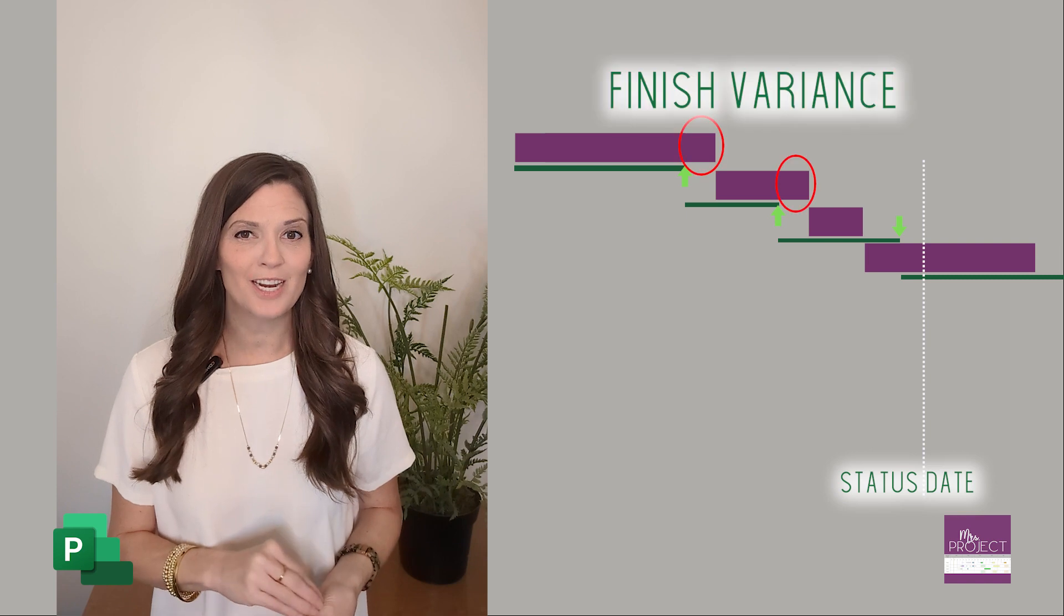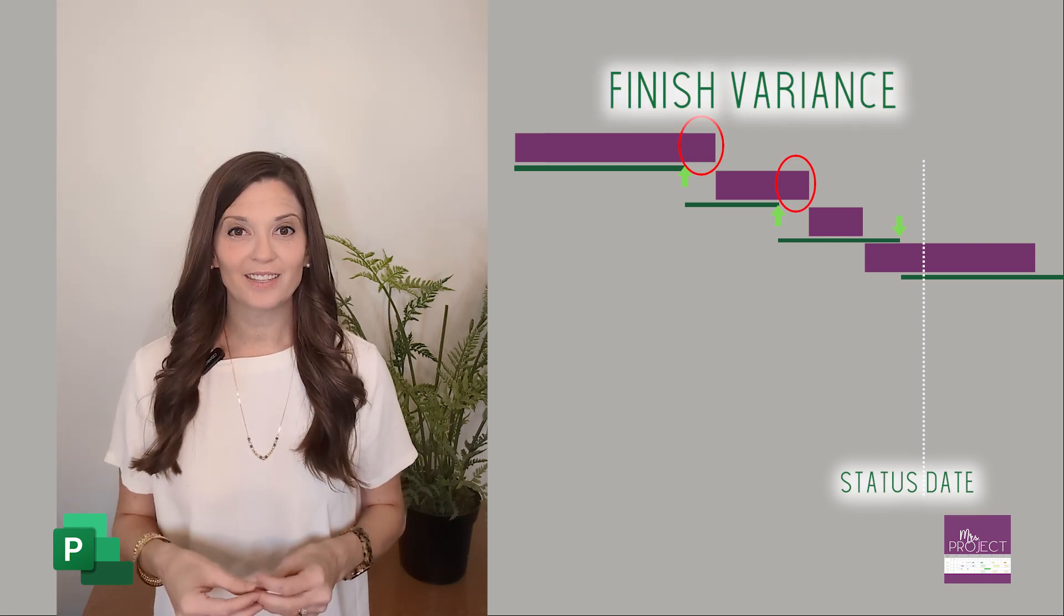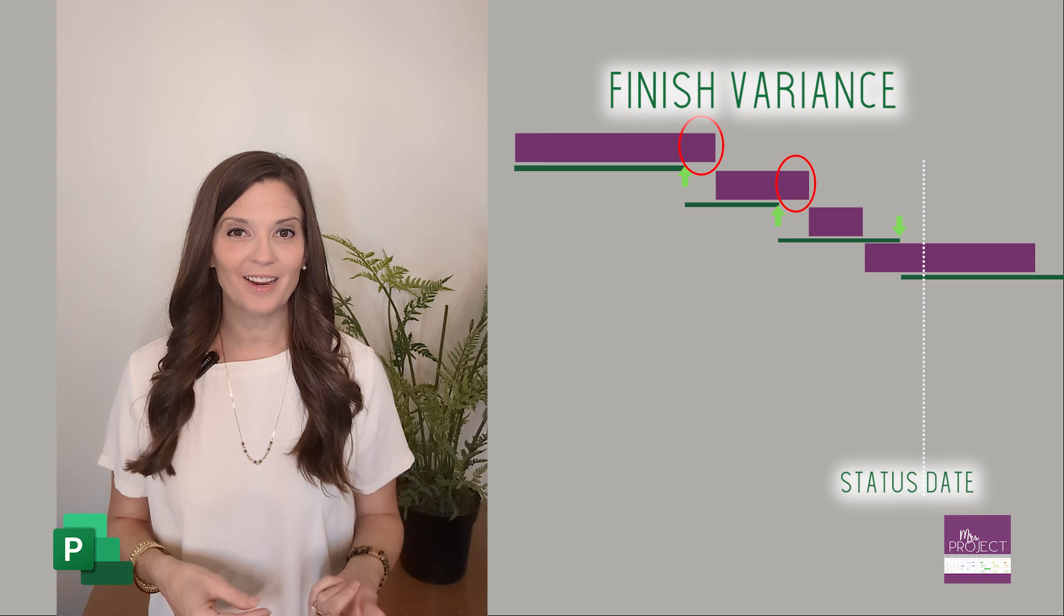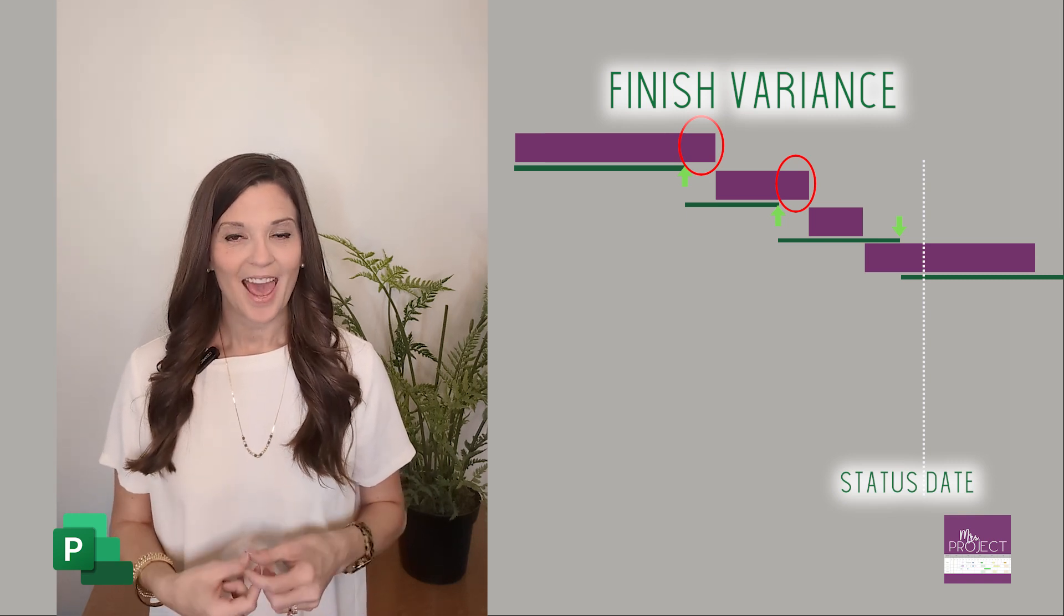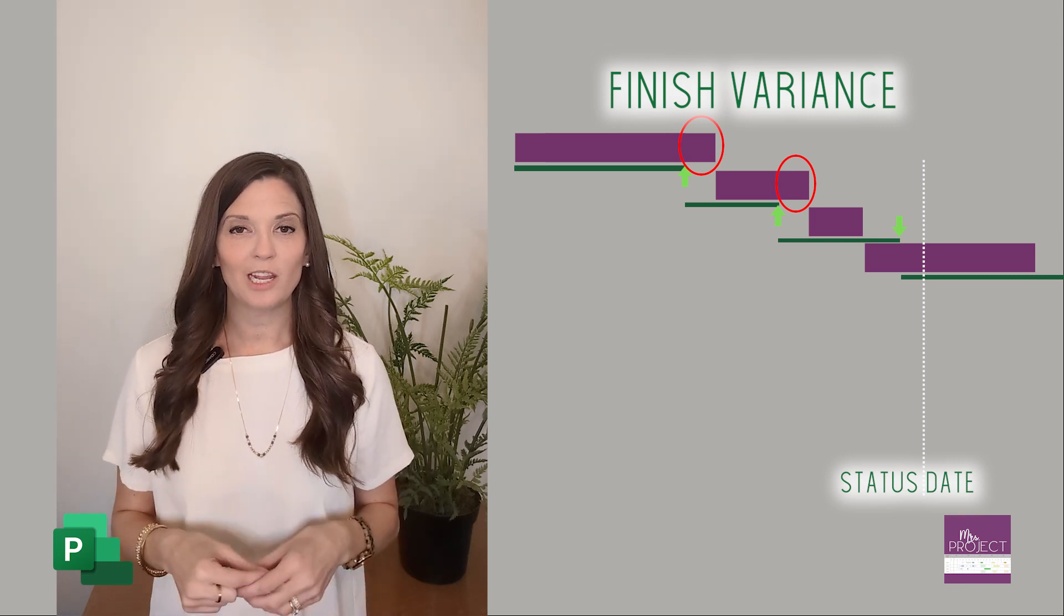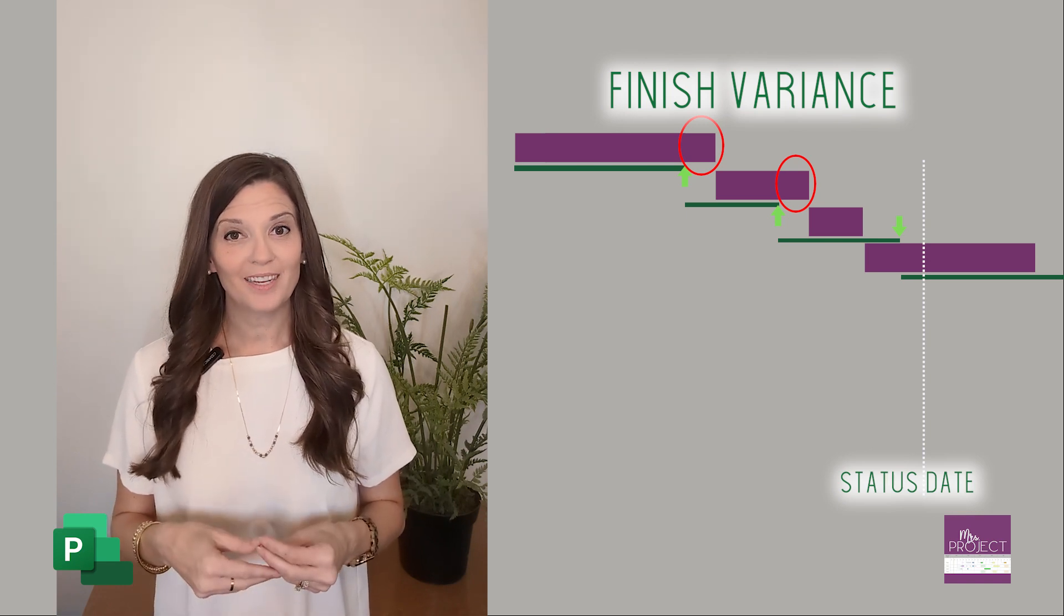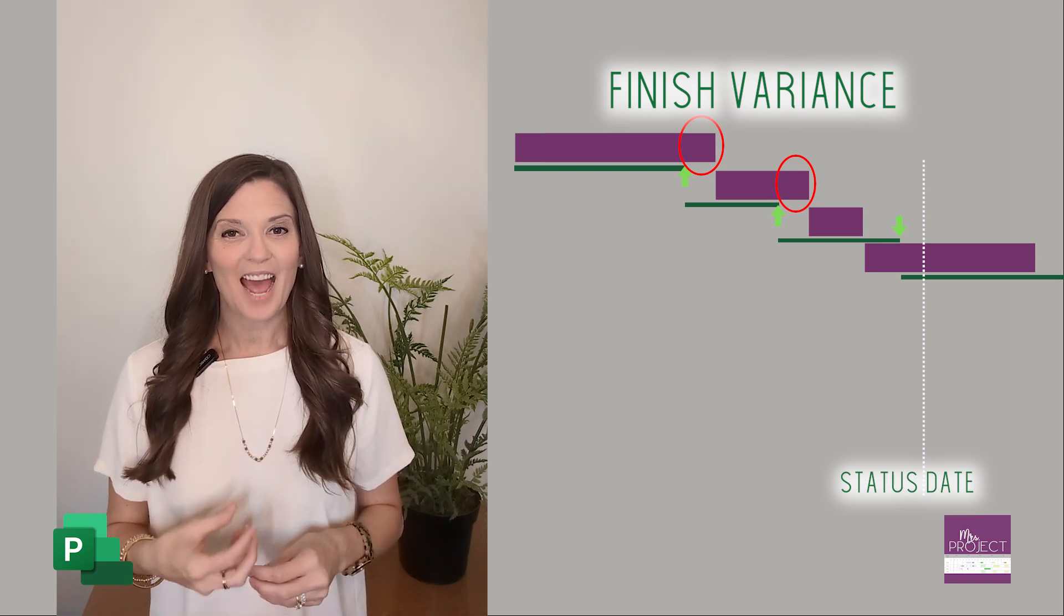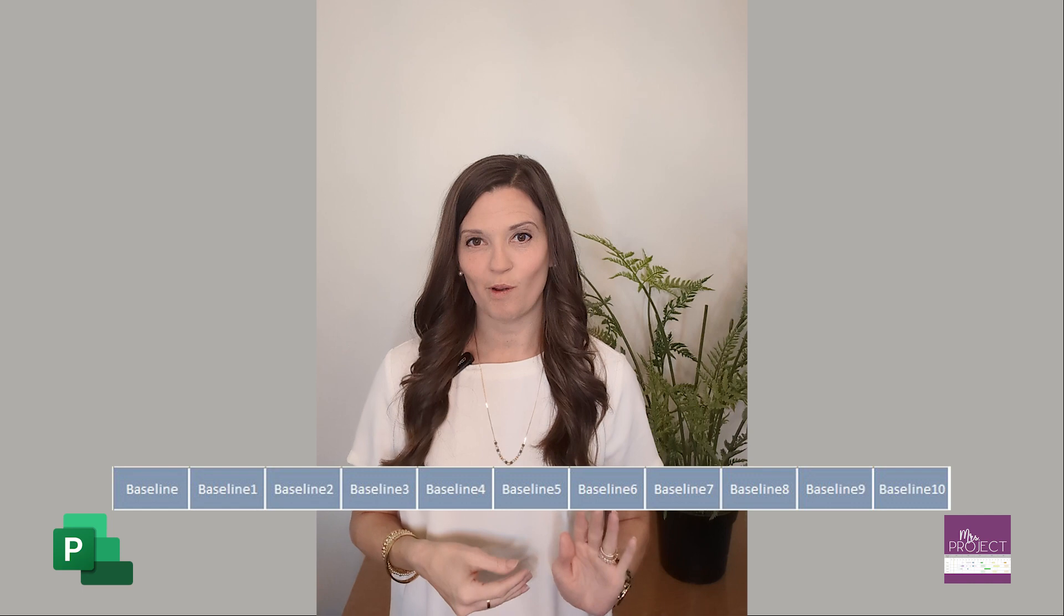You're also going to say how many of those tasks have a finish variance that is greater than zero. The finish variance is calculated by Project using your baseline finish against your current promised finish, calculating the distance between them. It could be negative or positive. If it's positive, it means it has slipped and how many days it has slipped. Your finish variance is based off of your baseline zero, not baseline one, two, or three.